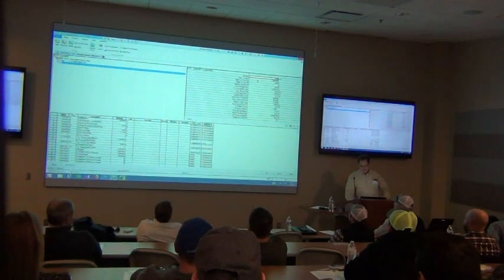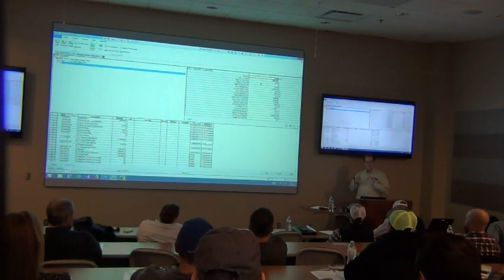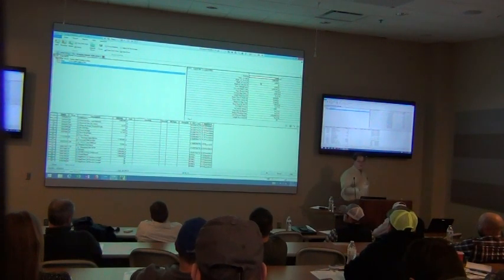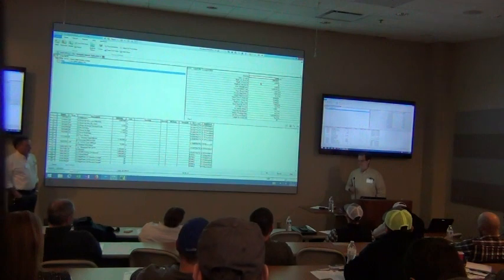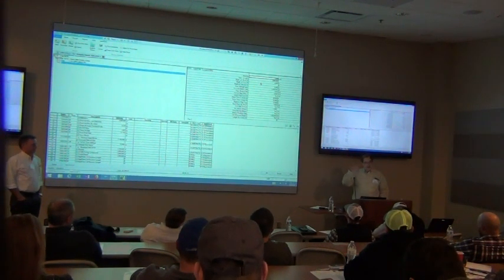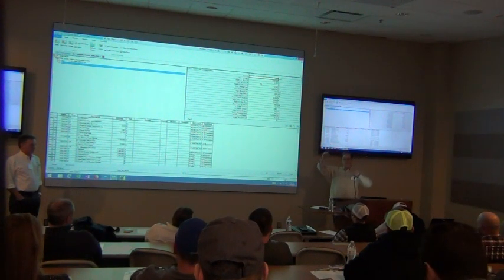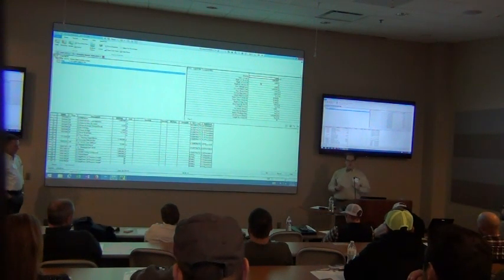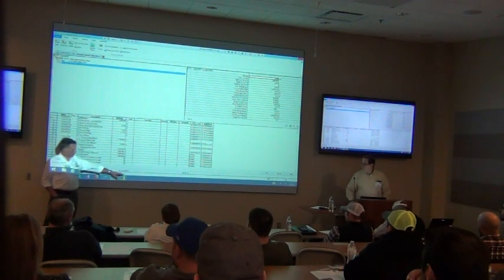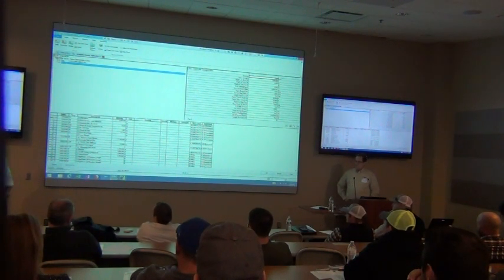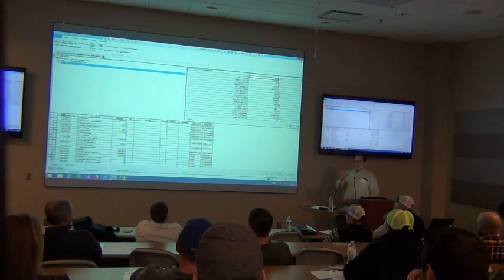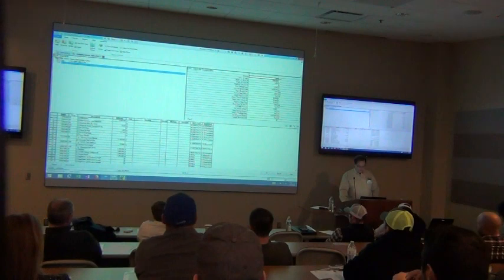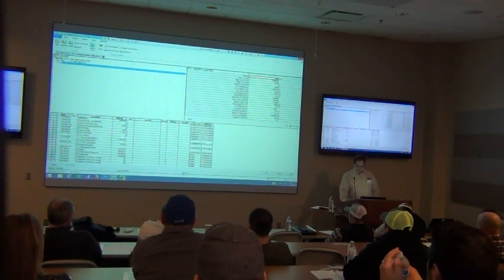I'll fly through the rest of these because the content is somewhat irrelevant. The main thing is that whatever you've set it up to do, it comes back and quantifies whatever line items are needed. If it's going through general conditions — do you need to heat this project during winter? Do you need a tool trailer on this job site? — the system helps make sure I'm catching all the bases of whatever picture I'm trying to put together. And at the bottom, it shows the total for this segment of the quantity survey.